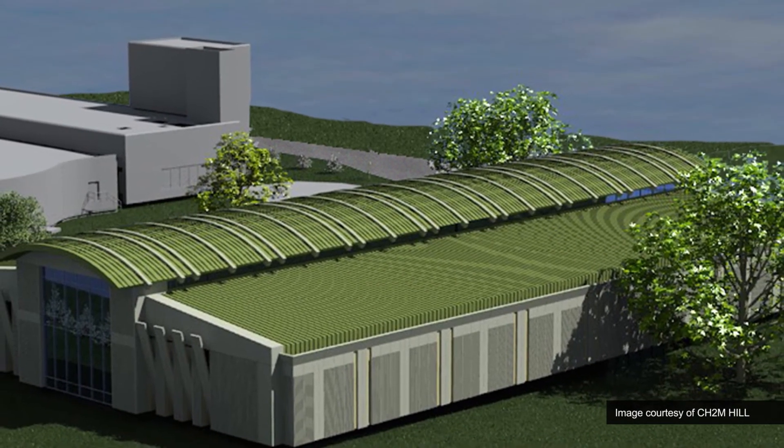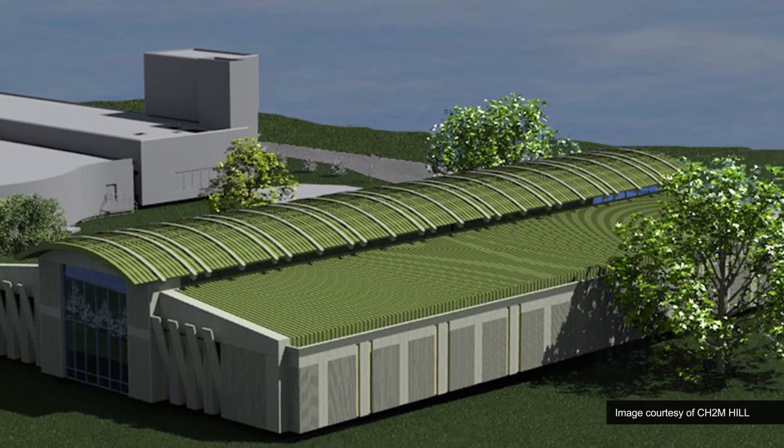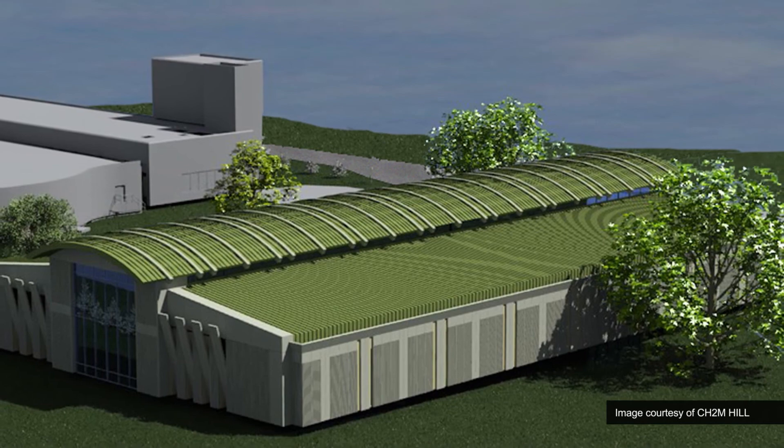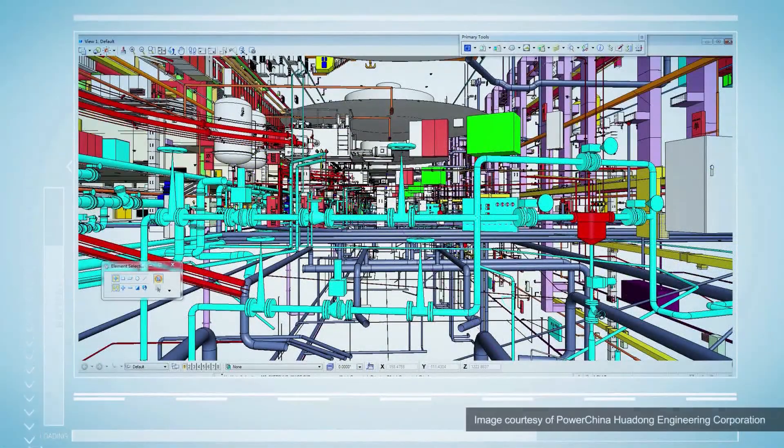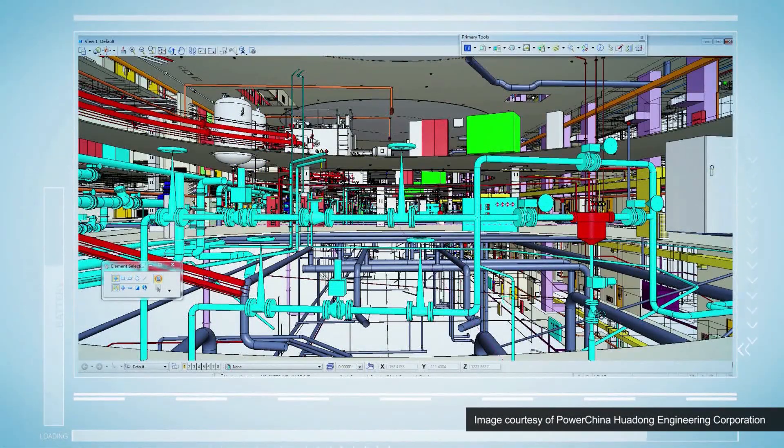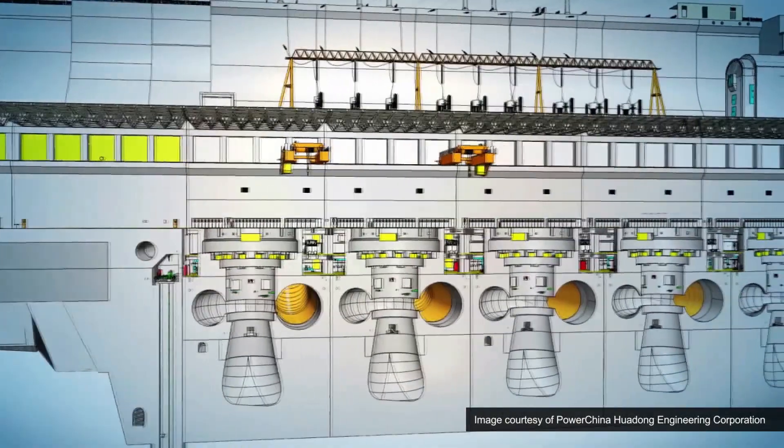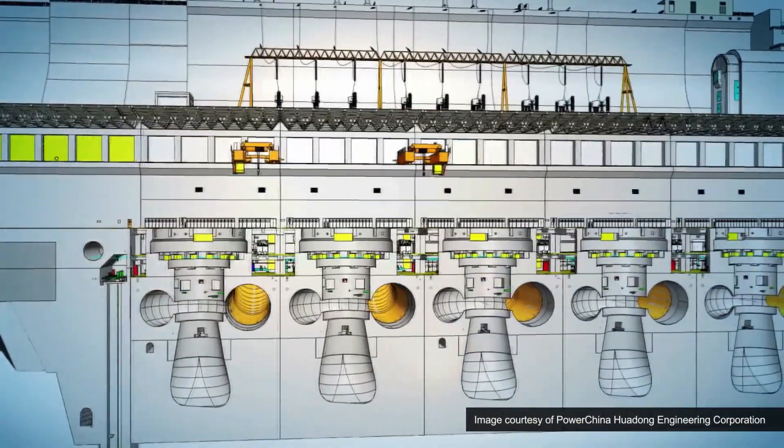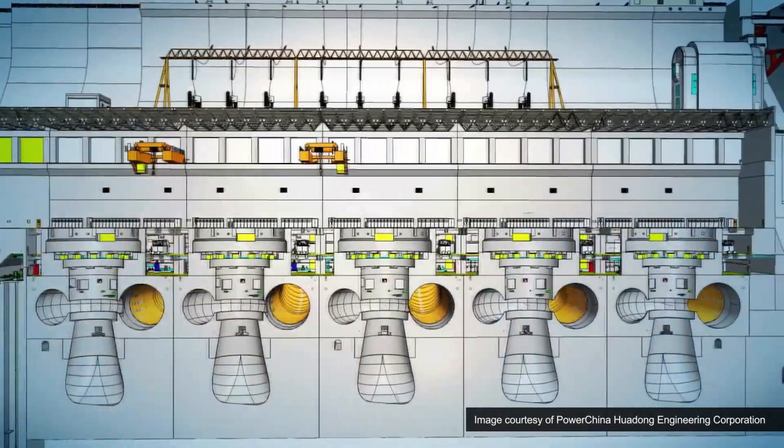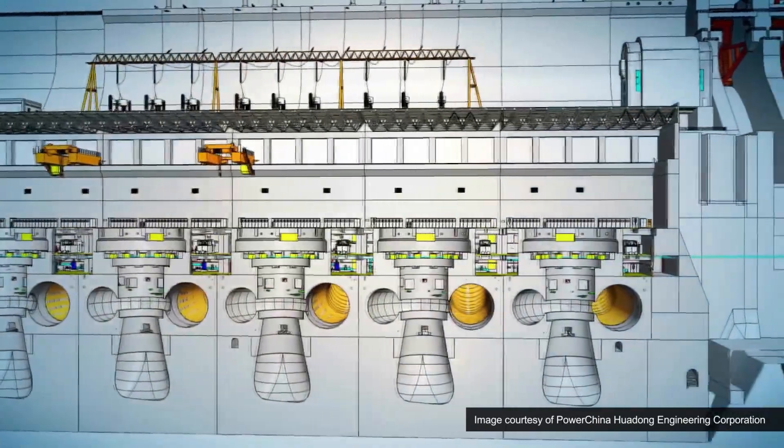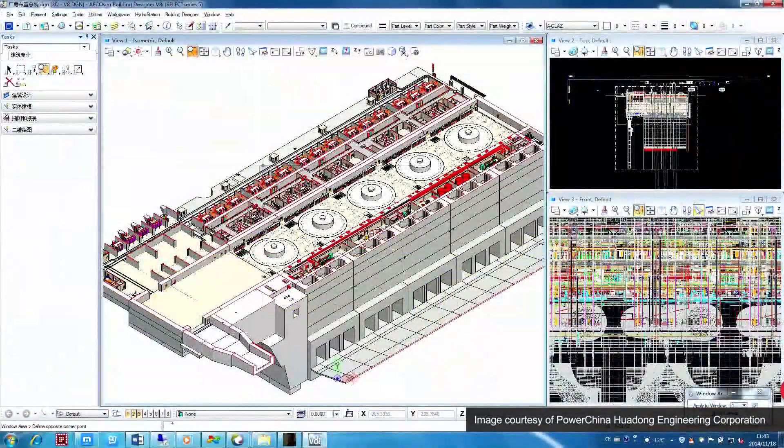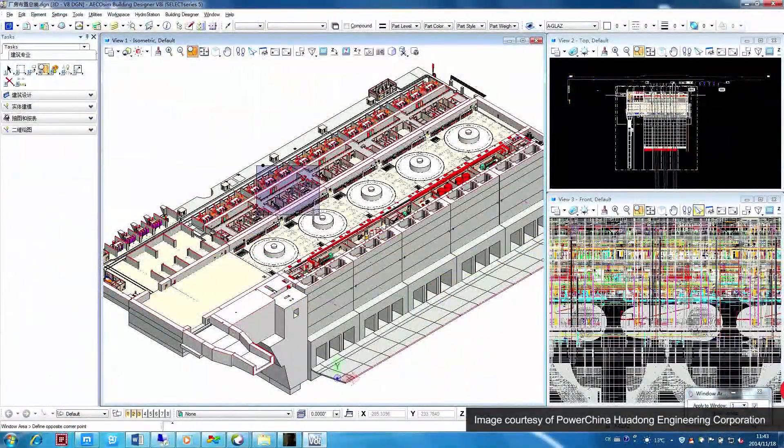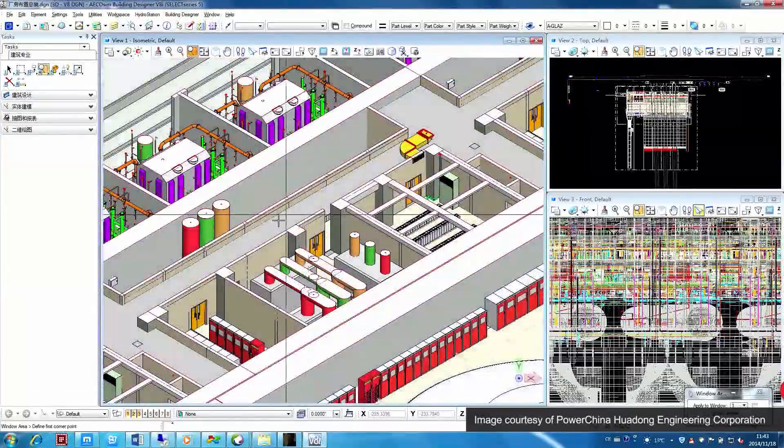On the Yinsha River hydropower station project, PowerChina Wadung Engineering Corporation improved design efficiency by 40%, reduced design time by 50%, saved a total of 1.79 billion won and generated power 10 months in advance of expectations.